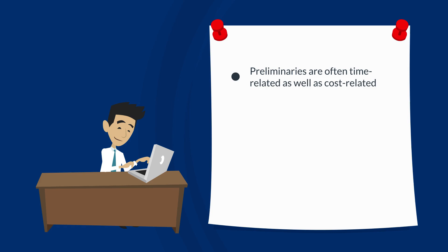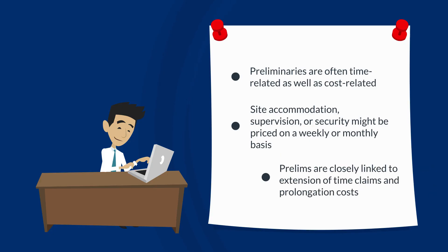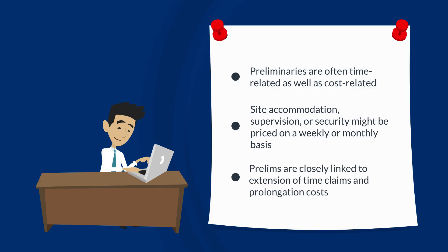Another important point with preliminaries is that they're often time-related as well as cost-related. For example, site accommodation, supervision or security might be priced on a weekly or monthly basis, which means they can increase if the project runs longer than planned. This is why preliminaries are closely linked to extension of time claims and prolongation costs. As a QS, you need to understand both the fixed and time-related nature of these costs and make sure they're properly accounted for if the program changes.